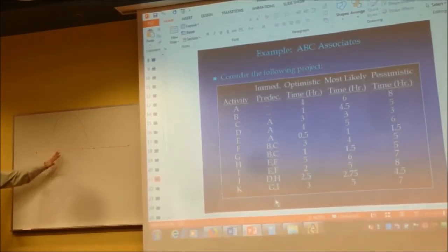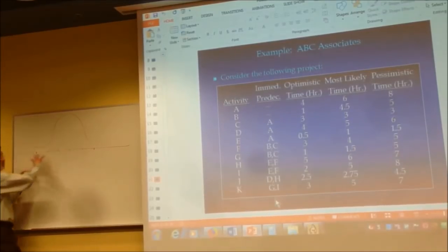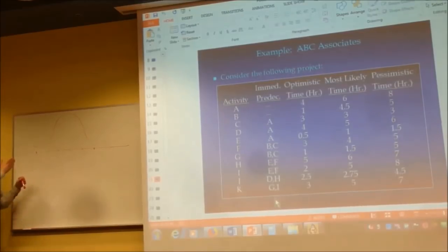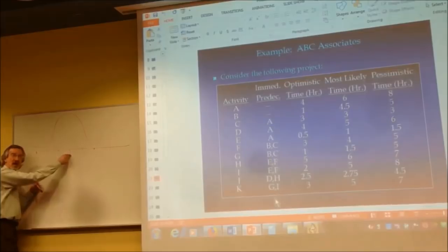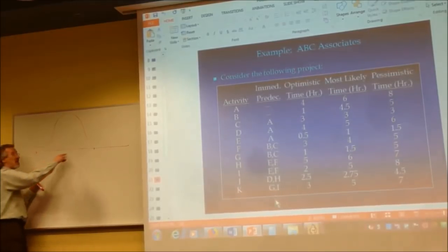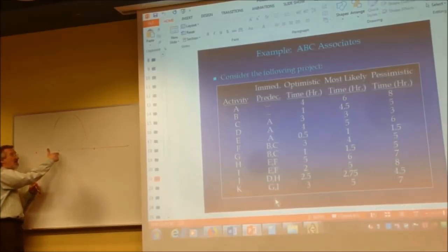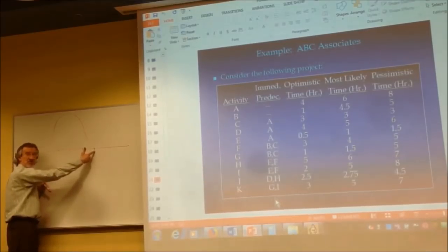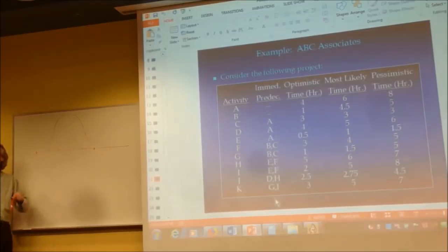Now, let's get this back to project management. You ready? I want to make sure you understand, this is nothing but a number line. You decide what numbers to put on it based on the expected time, or the mean. And then, once you calculate the standard deviation, you'll add 1 standard deviation, and you'll know what this number is on the number line. You add a 2nd standard deviation, you'll know what this number is. Subtract, subtract, and you'll know what those numbers are.